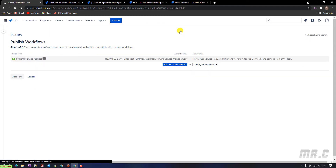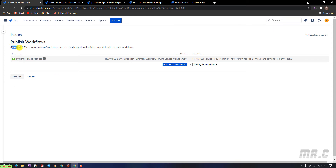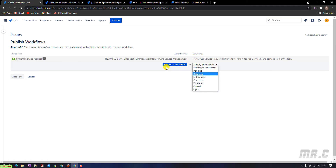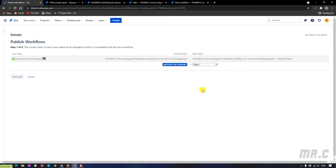It will direct you to another window. On this window, you have two steps. Step one, you have to do the mapping. Because in the current workflow we have the status 'waiting for support', but in the new workflow we don't have that status anymore. So I have to select the new one for it — meaning any ticket with the current status 'waiting for support' will automatically change to 'open' when I switch to the new workflow.